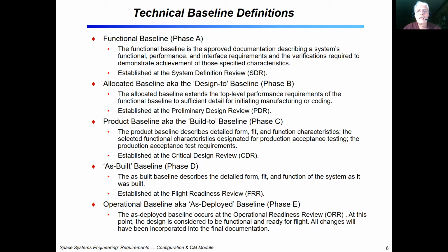After that is the design-to baseline, all right, where you're going through more top level, you're refining your system and providing more detail as to how your development is. Notice that this one is established at the PDR level. So this is what I would be saying is leading up to the development phase.